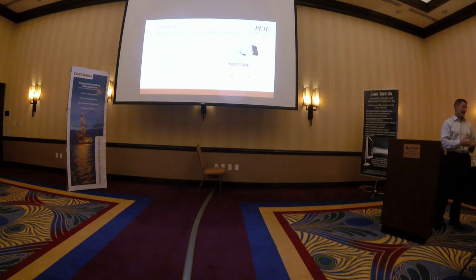Payment. Are you going to get cash for this $1 million tool you just built? Now, if the contract says the MRB has got to be with it, and the MRB could be months if they haven't been doing it throughout the life of the project. So you need to make sure those project deliveries are included in your schedule and that they're meeting their milestones, that there's KPIs for these.